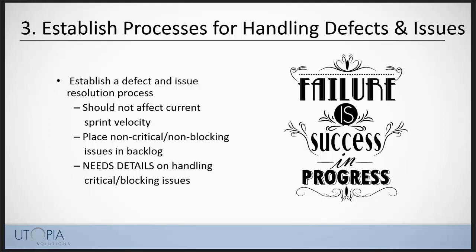And you want to focus on building for velocity. So don't sacrifice velocity. Use the slack time to fix only the critical things, that 20% and the 80-20 rule I just talked about. And then you need to put everything else in the backlog. Get your stakeholders to buy into the approach of putting things that aren't critical in the backlog at the kickoff meeting. So, backlog, backlog, backlog. Get comfortable with putting things in the backlog and make sure your customer is too.